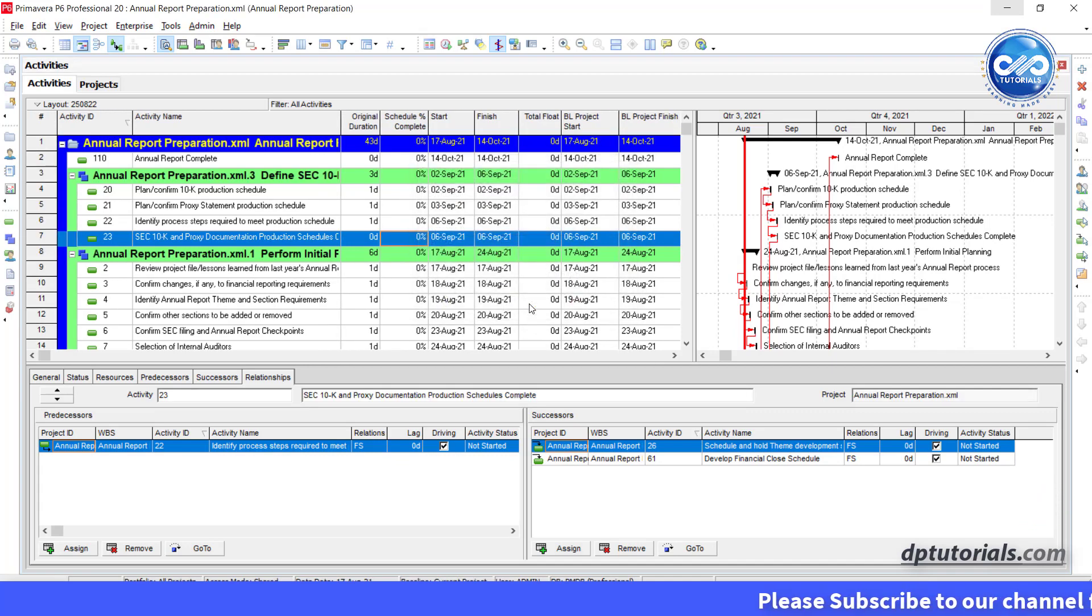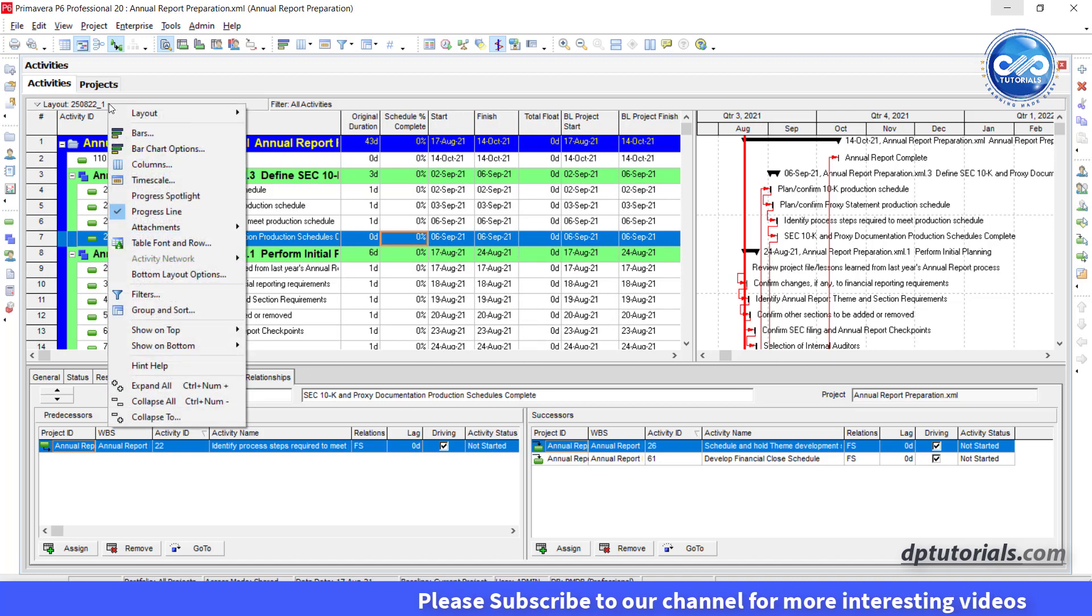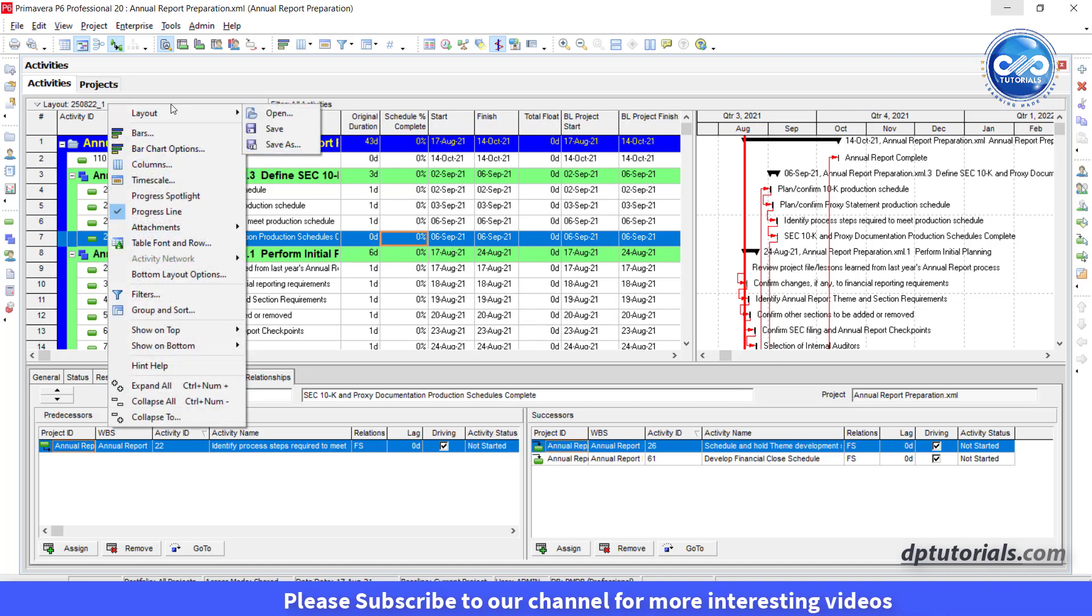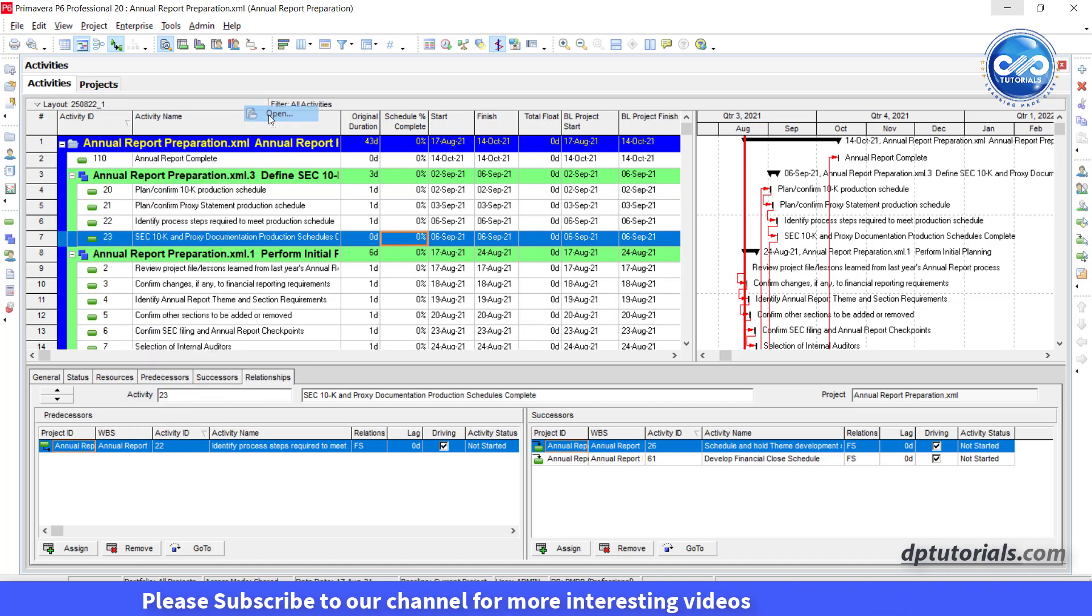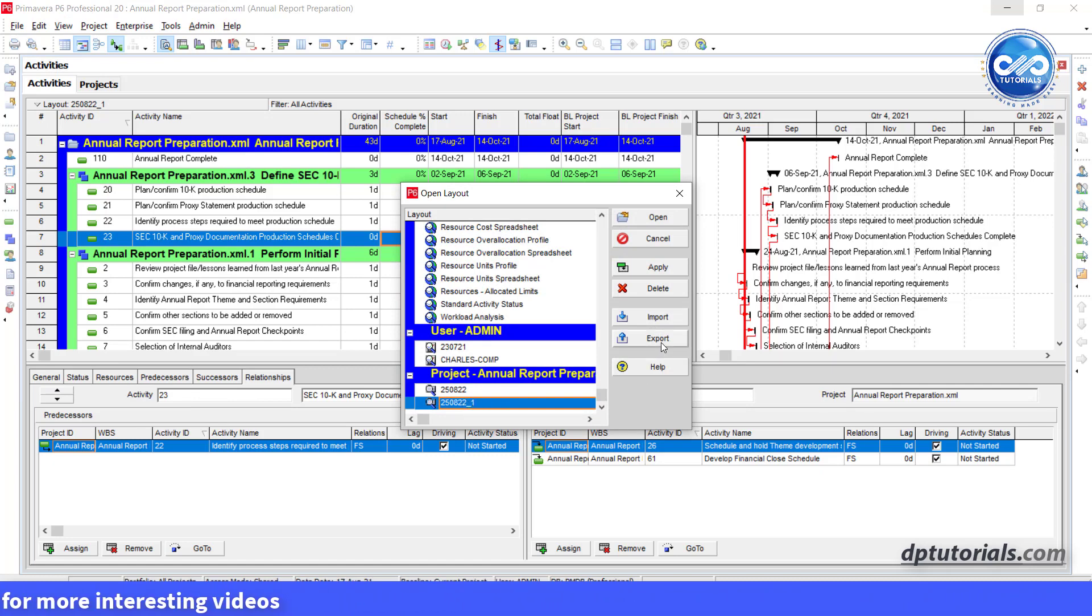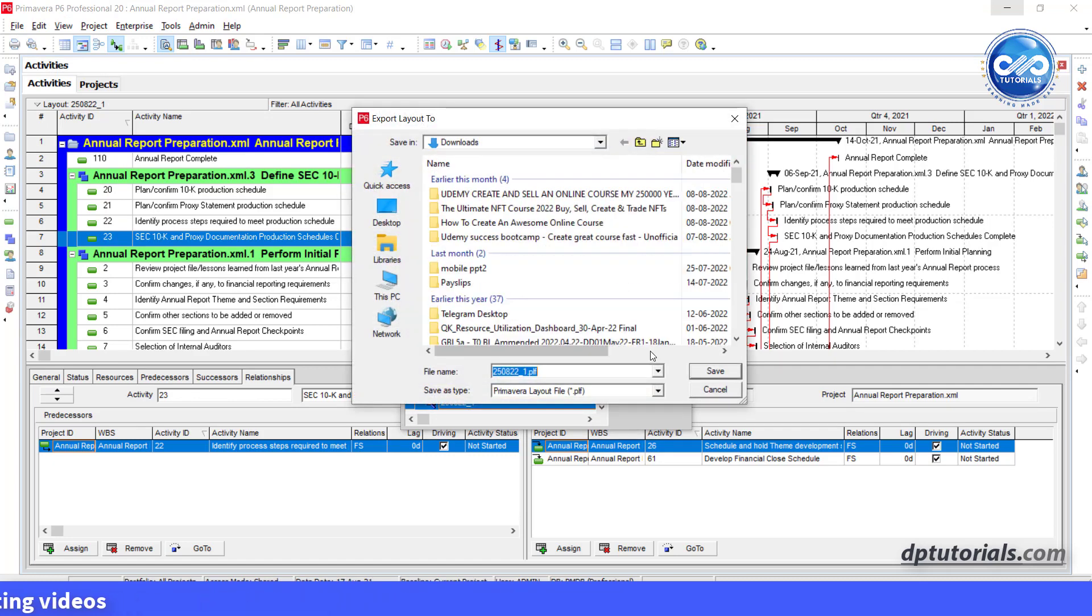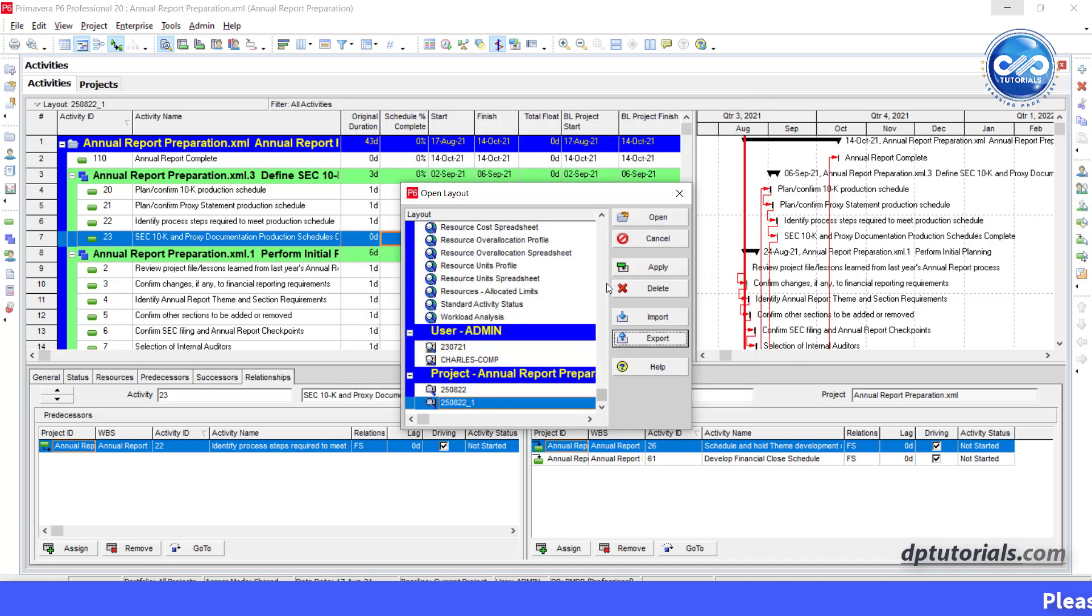Now if you want to export, again go to the layout drop down and click on open. Select the particular new layout and click on export. Give a name to the file and browse the location to save this file as .plf format. Now you can share this layout format to any user who would like to see their project in your format.